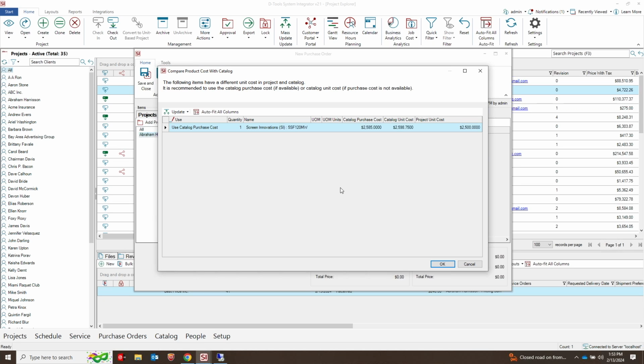So I have a purchase cost where that box always costs $185.67. That way you can use the purchase cost, which is the real cost when you're buying that box, versus the math-out value from taking the footage times the unit cost. So this field is important here.